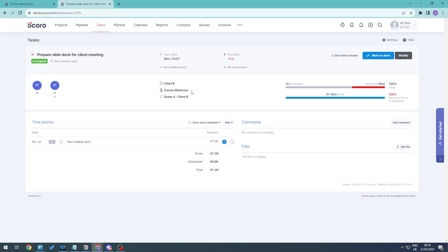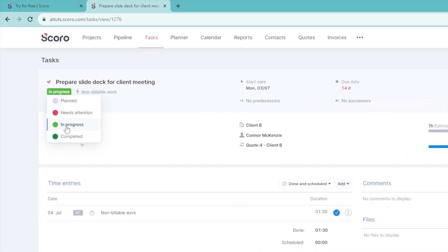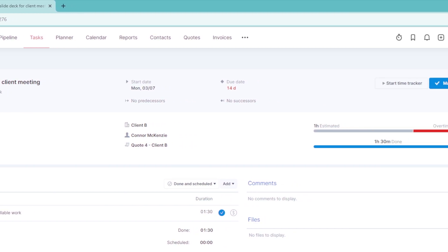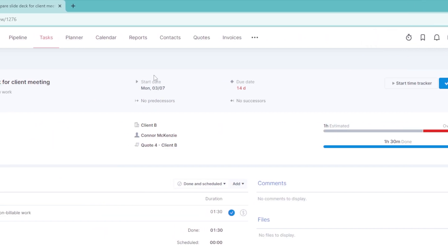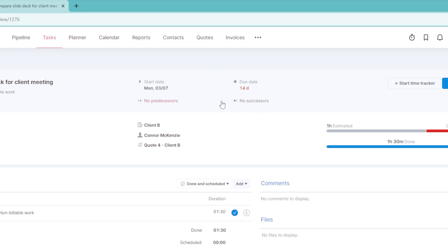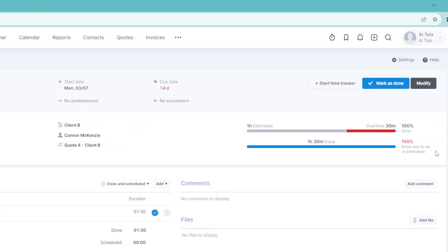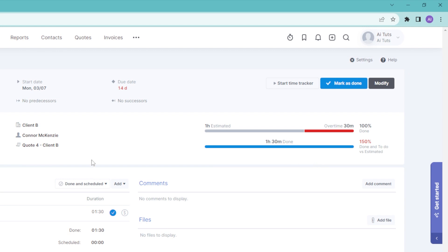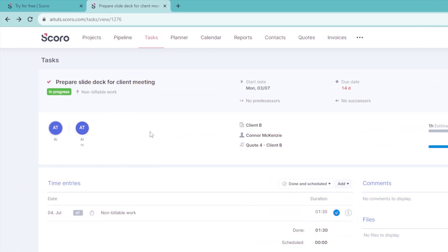This is what a particular task looks like when you open it. We can see the progress — planned, needs attention, in progress, or completed. At the moment it is in progress and it is non-billable work, meaning no time tracking is required. We can see the start date and due date — this one is already 14 days delayed. There are also connectors showing dependent tasks and subtasks, along with all connected metadata for this task.